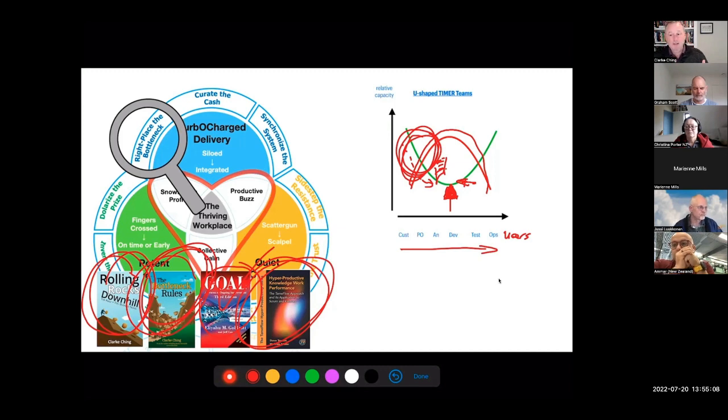Because we've got all these developers, and they pass stuff that's either low value and high effort to the developers to keep them busy, or they pass stuff that's not ready to the developers. They give it to the developers and then it loops back and comes back as rework. Yeah, this is really, really obvious, but it's really, really not obvious.